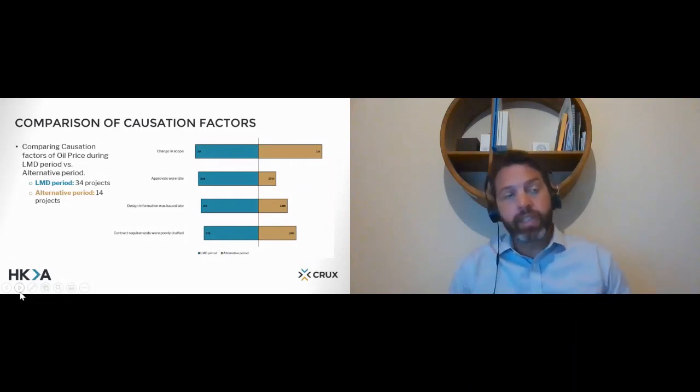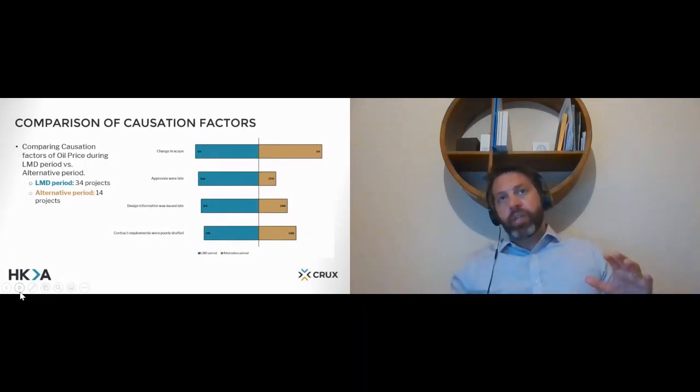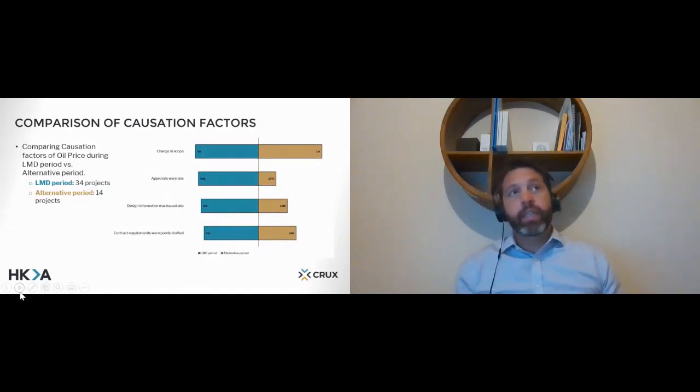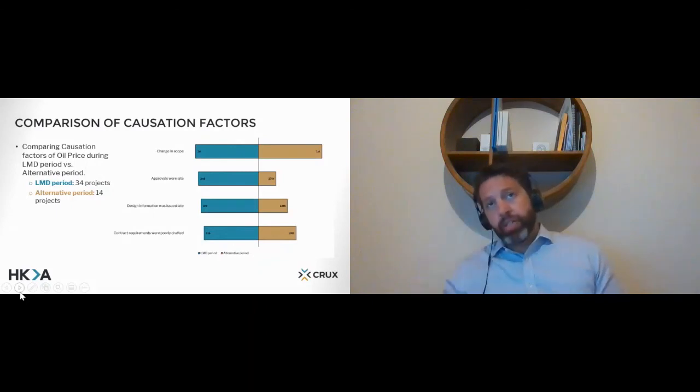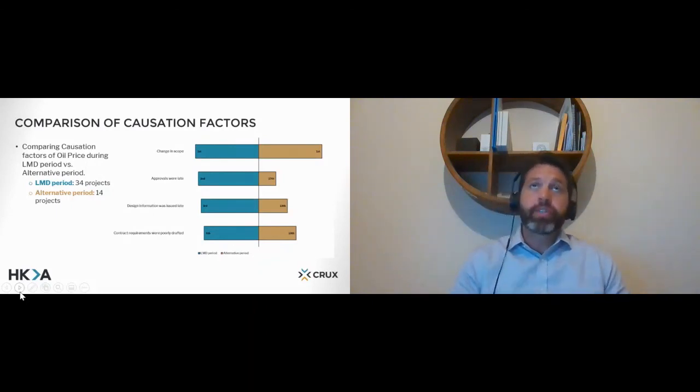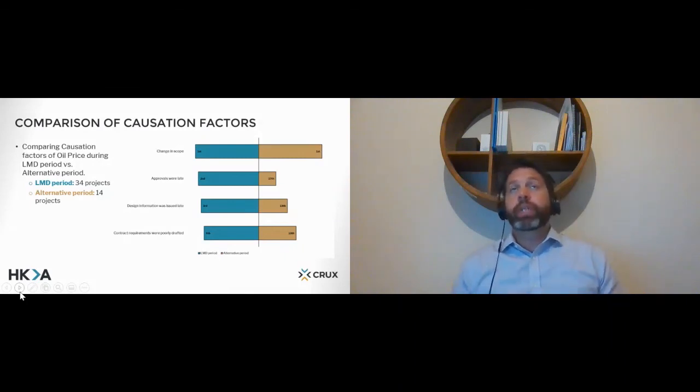The last one is a really interesting one. Before the drop in oil between 2014 and 2016, the oil price was very high. I think a lot of commercial agreements were made in the industry which didn't really test the contract terms and conditions. And when the oil price dropped, there was more resistance from the parties to do those commercial deals. That meant that the various mechanisms drafted under the contract were tested, and that's why you see this one coming up.